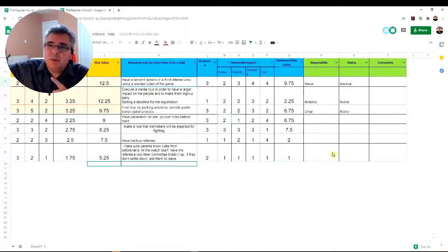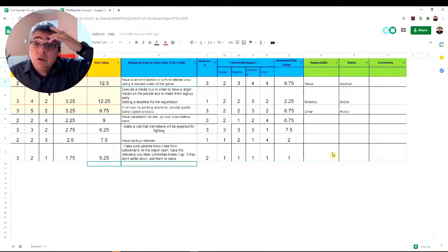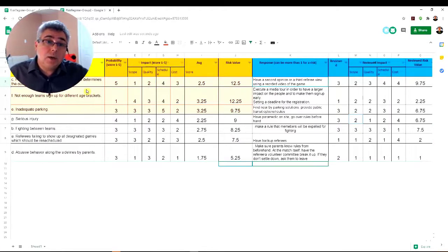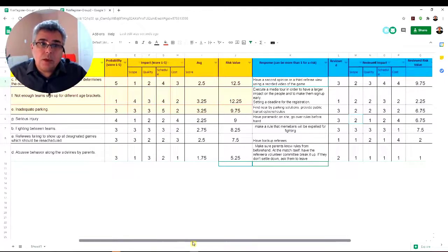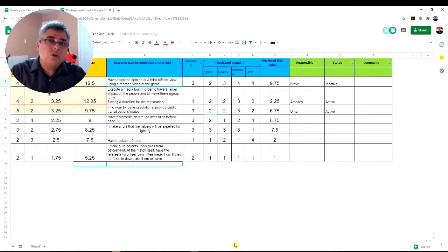When you display the activities that will be executed in the following week during the execution phase, you come to your risk register and try to understand if there is any risk related to the tasks that will be executed in the following week. That's the way you can assess and filter, see the WBS ID, connect the risk, and that's the way we do risk control when we are executing the project. Okay, that's very important. Risk control when you're executing the project.